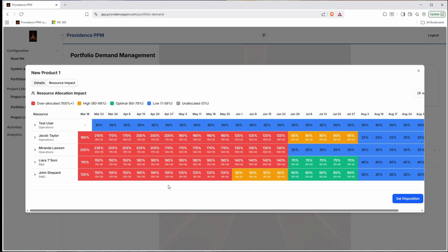Okay, can we even start this with these proposed resources? Are there other resources we can look at? And if there aren't, do we need to reprioritize a different project based on our executive override here that this is actually a top priority project? Or do we make the decision like, we would really like to start it, but we can't until probably around the end of June, when most of these resources get a little bit of bandwidth, maybe even later, depending on how much bandwidth it's really going to take from them.